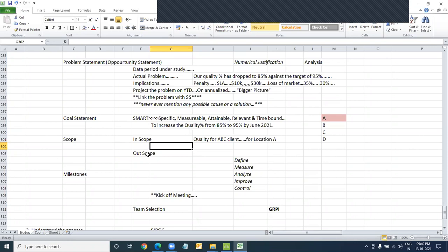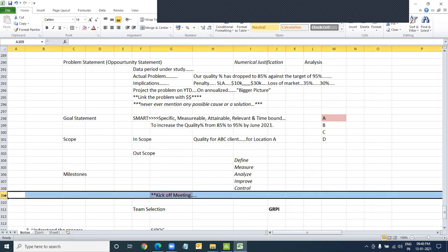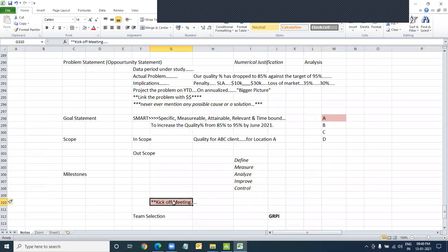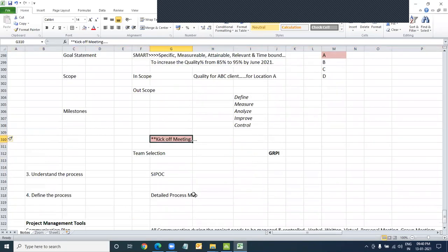Please share it whenever you get it, because individually everyone needs to get feedback, because you will be the one who'll be writing this. Now, having said that, say once we're done with this project charter, we have submitted the project charter, and management will review. Now, management would technically involve your champion, who would involve your sponsors. Champion is convinced, and practically you will go for a kickoff meeting. Now, kickoff meeting is when you get officially approved that yes, we have got the project.